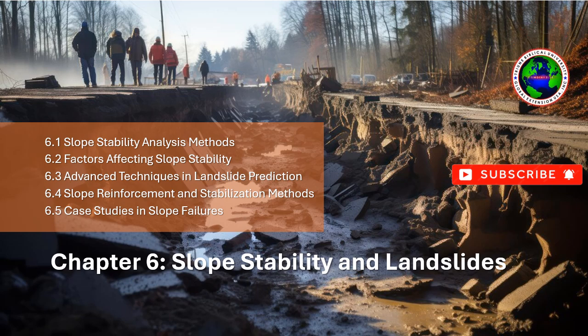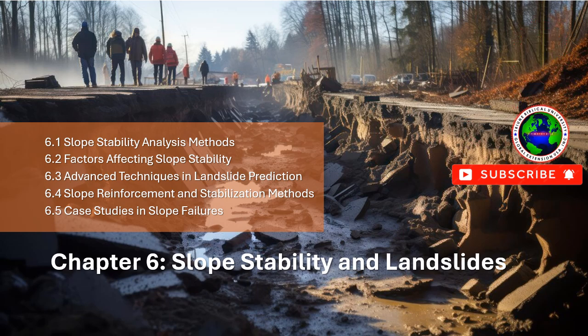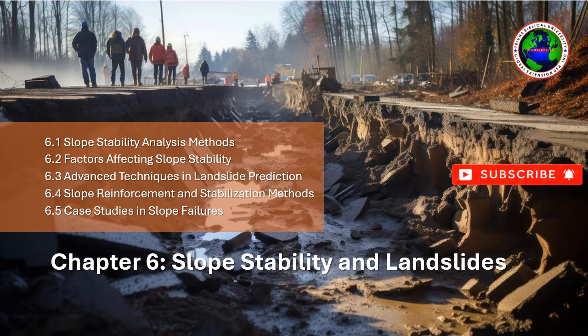Mitigation measures. Containment and diversion. Efforts were made to divert the mudflow away from populated areas through the construction of embankments and barriers. Monitoring and control. After the event, an extensive monitoring system was put in place to study the behavior of the mudflow and prevent further damage.